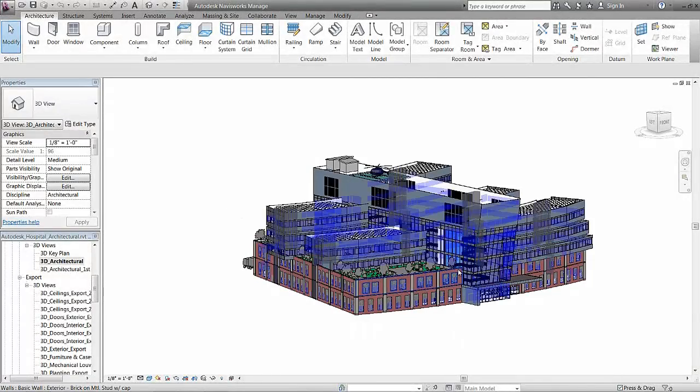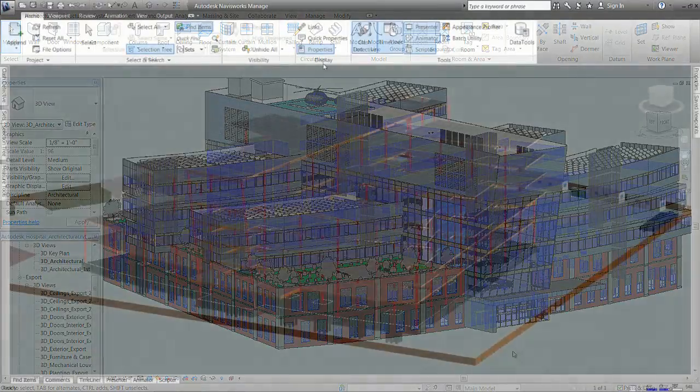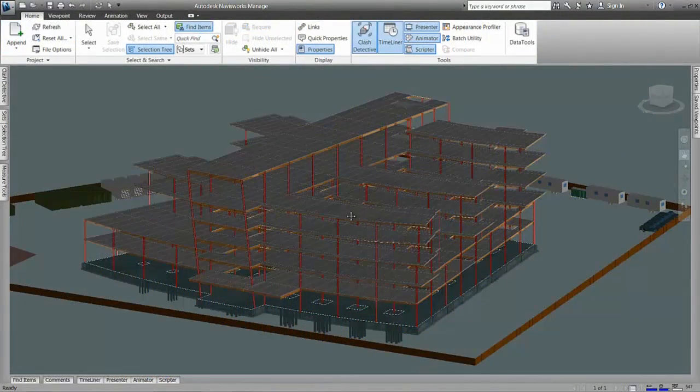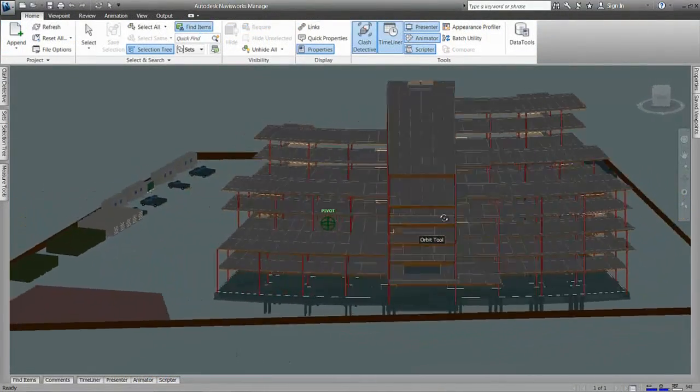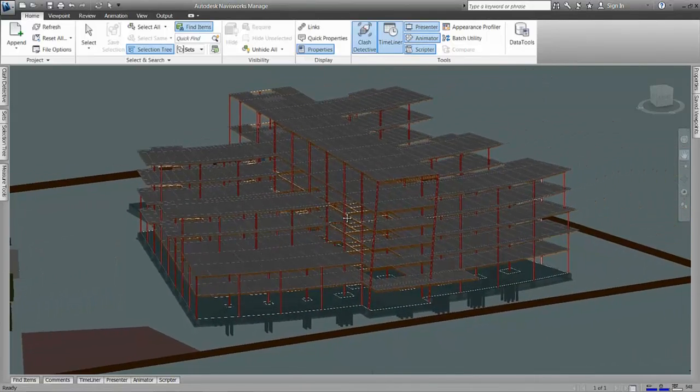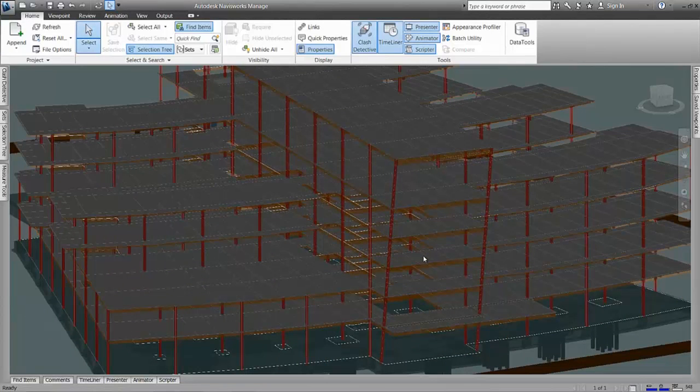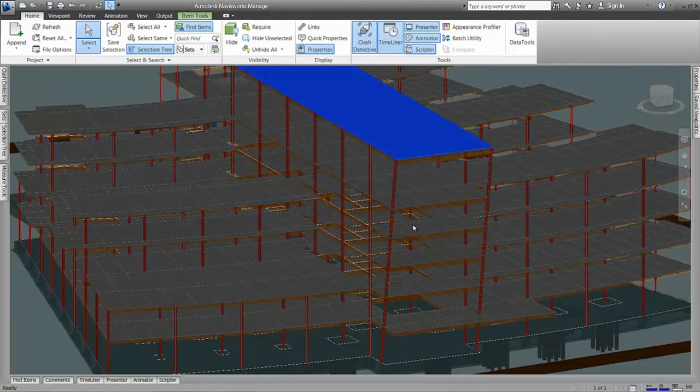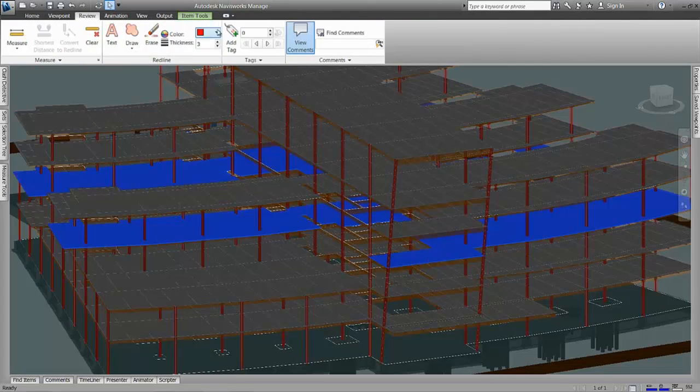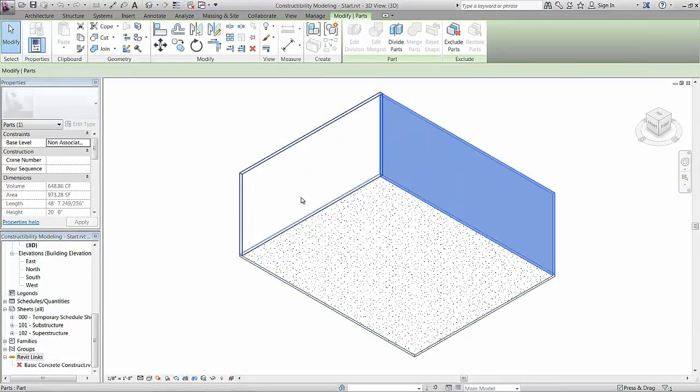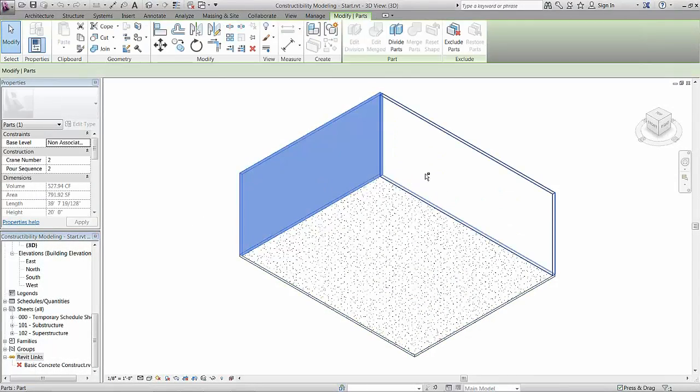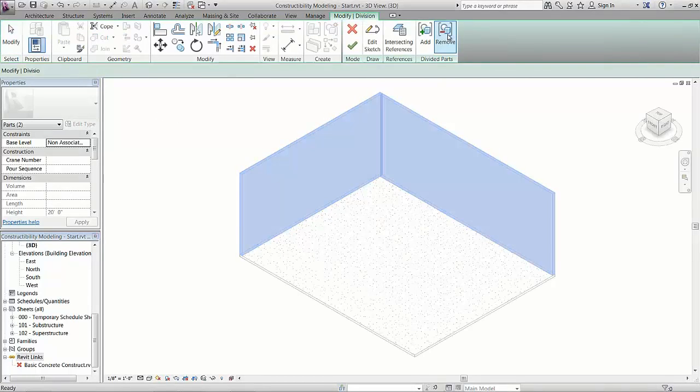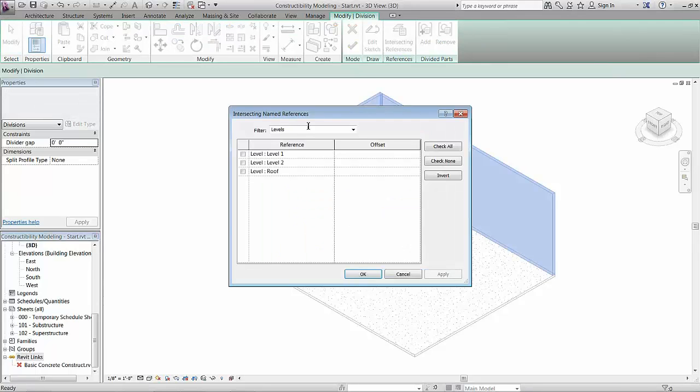Contractors often receive design intent models or simple documentation from the architects and engineers. However, in order to really have this information be useful and helpful in driving the construction practice, new levels of information have to be added to the process that account for means and methods, materials, and how those project components come together. This is really the role that constructability plays. With the Autodesk Construction Solution, BIM or VDC engineers, superintendents, and project engineers can adopt a digital approach that reinforces constructability, bringing their construction knowledge to the project earlier in the process.